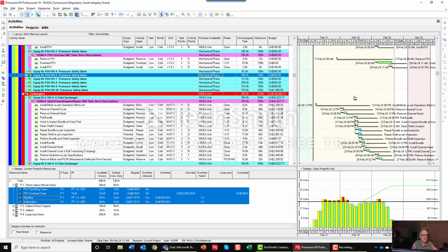It could be based on systemization, unit, plant, a number of things that operations wants to hand over, for example, the flare system or the steam system. And they say, here is the system, lottoed. We'd like it back for PSSR and mechanical completion certificate on this day. So how do I do that? So again, I'm going to go in and create this window.